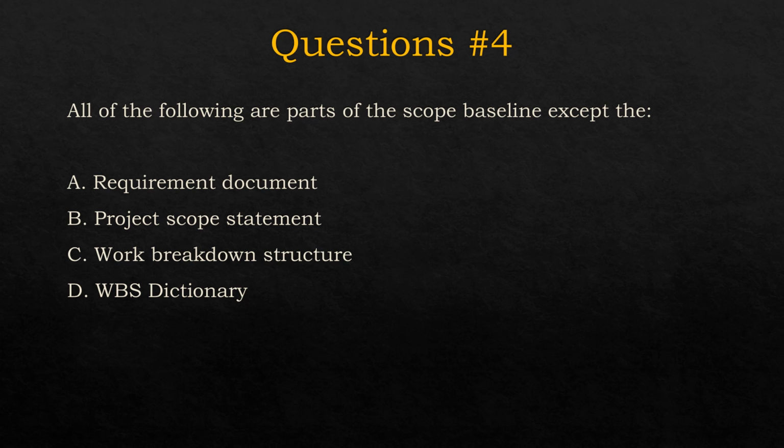Question number 4. All of the following are parts of the scope baseline except. I'll give you 10 seconds to think, then we'll choose the right answer. As we discussed, the scope baseline contains the project scope statement, work breakdown structure, and WBS dictionary. So the right answer is the requirements document. This is not part of the scope baseline. The right answer is A.